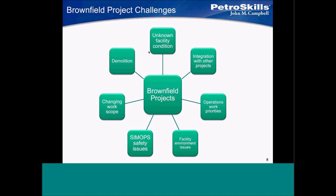Integration with other projects: just like you're managing this project, there are other project engineers and project managers also trying to get their brownfield project done at the same time. And as some of you have probably seen, you go out, take dimensions and drawings, generate some drawings, fabricate everything, come out to do the installation — and somebody has done a project over your installation and changed some things. That's the nature of the beast.